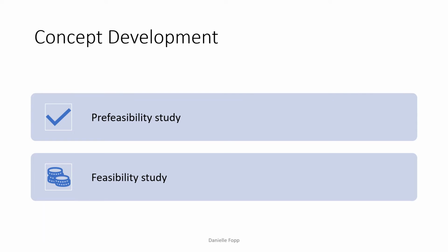For that reason, possible project financing must be considered early in the feasibility study stage, as financing conditions have a direct effect on total costs and thus on the financial feasibility of the project. A feasibility study should also provide all data necessary for an investment decision. Now let's take a closer look at both of these.